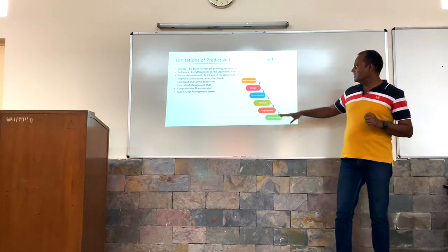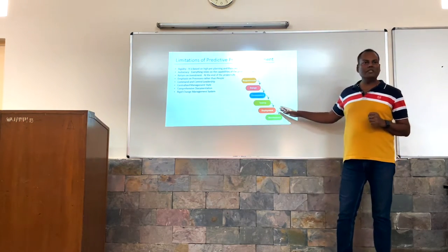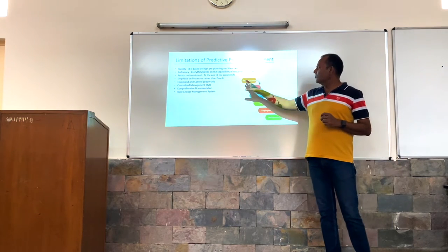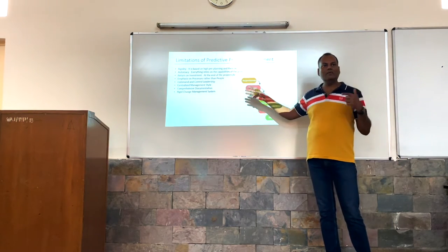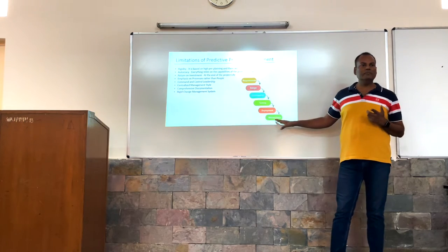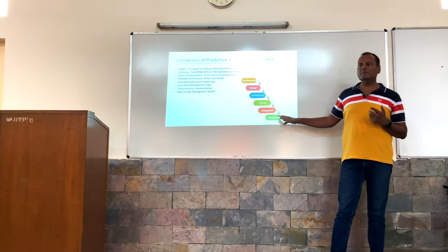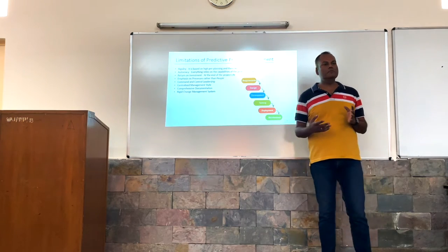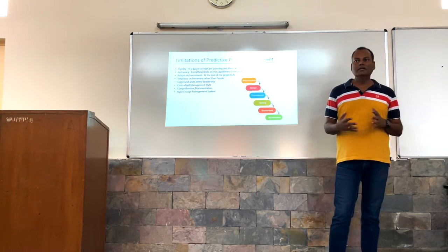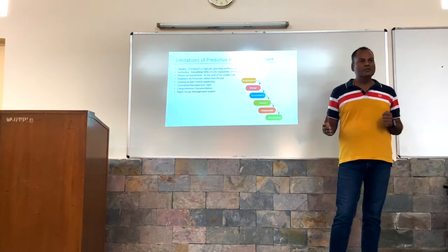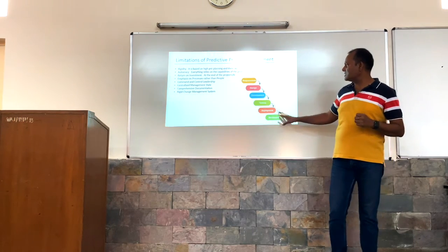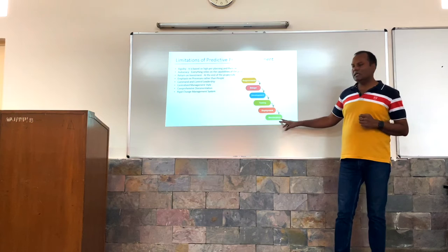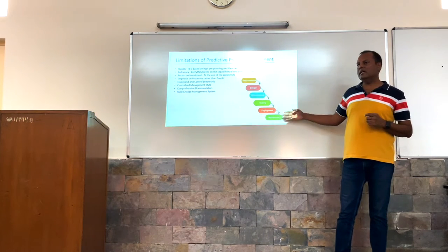The entire phase sometimes takes 6 months or 1 year of cycle to complete. And many times, the requirement they got 1 year back is no longer valid at the time of deployment, at the time of meeting the user. So when it reaches the end user, maybe it's obsolete, outdated, or the requirement got changed. So there is a lot of problem in this space. Like, if a company invests some money at the start of the project, they will get their return only at the end of the project.